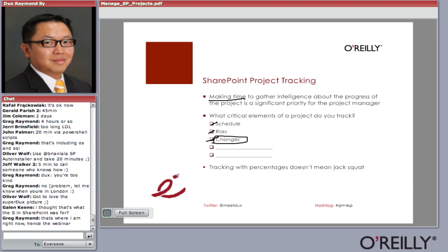Their reasoning might be valid, but you have to go through a decision-making process for people to say, okay, why is it important to change how it looks? Let's go back to our list of priorities. Well, because we have a new ad campaign, because this will be public-facing. Okay, well, that means we have to hire a really good branding person, and it's going to take this much longer to do it, yay or nay. Involve them in the decision-making process. You do not ever just want your resource to take all these change requests and have them start doing it.